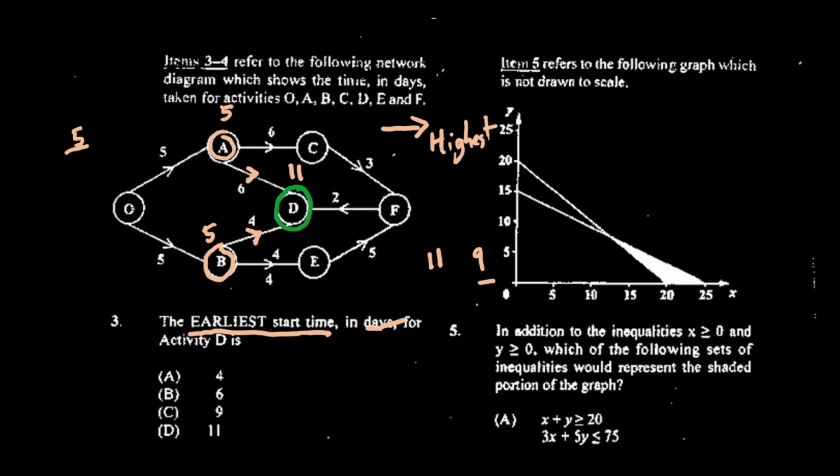And A now has to get ready in 5 minutes and then walk to your house in 6 minutes, which would take 11. So A is like the late friend. Everybody always leaves late because of this person. So you have to wait until the last person arrives before you can actually leave to go to the shop. So therefore, in this case, that's why we look at the highest number. So the highest number in this case would be 11. So our answer is 11.